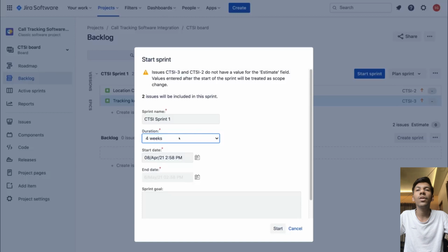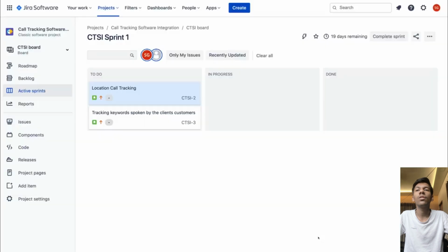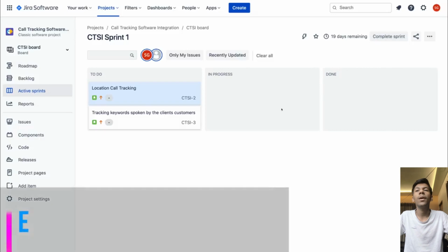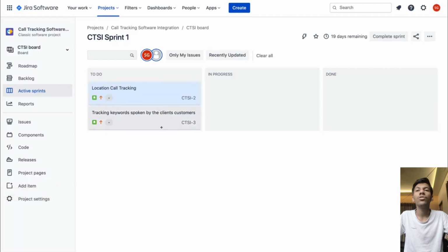What I am going to do is navigate up to create a subtask, and create a subtask within this story: create the tracking code for the call tracking. This is the only subtask that we are going to have within the story. Once this subtask has been completed, then the story will be completed. So I am happy with that story and subtask. I am going to click close, and you can see in my project workflow, my sprint, I have one story here, one story here,